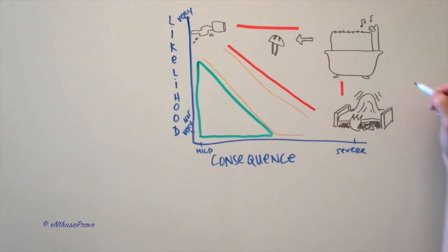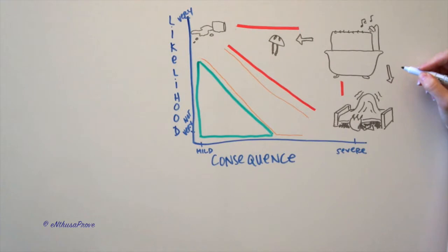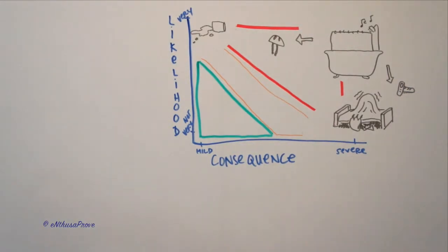These ideas might sound ridiculous, but you can agree that all of these things would lessen the consequence of falling in the shower. They don't decrease the likelihood of the fall occurring, just decreases how much it hurts. So could we lessen the likelihood of slipping in the shower? Let's think through some ideas. How about installing some non-slip coating to the shower floor? Or wearing some grippy shower shoes? Or we could develop a process for showering that reduces exposure to any angle that would cause us to fall.